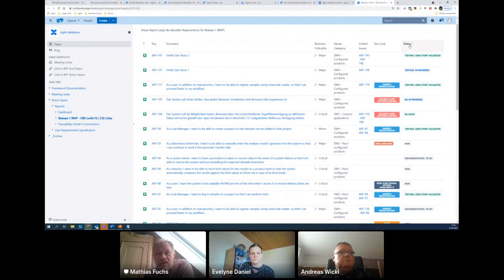If you see the status of these user stories, then as a QA, or also the product owner or stakeholders, really have the possibility to see at any point in time what is the status of my project. How many stories are still in review, that means they have to be developed? Are there stories or features that are already in a testing phase? Are there features that are validated already, so that means they have gone through the whole process of the user story? So it gives you quite a good impression of the status of your release.